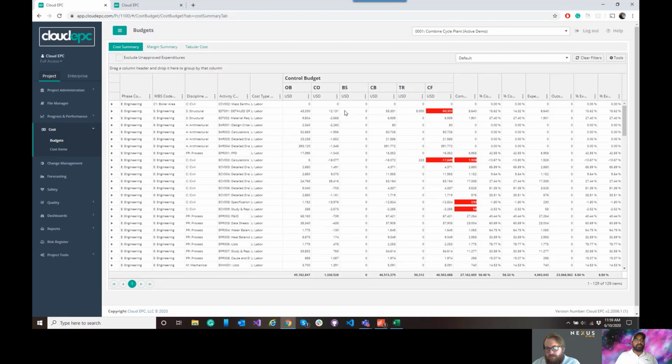and we can create a comprehensive earned value system, but also be able to do the nuances of being able to track our committed cost at a contract level and our work packaging and earned value at a progress granular detail level.